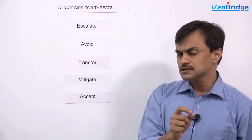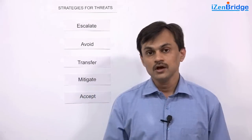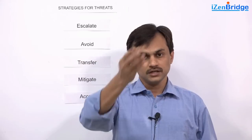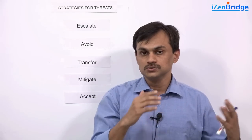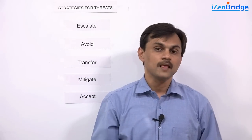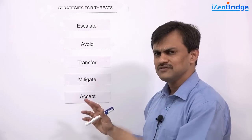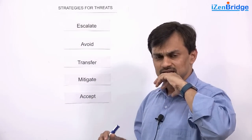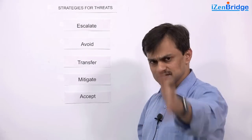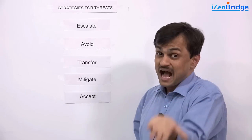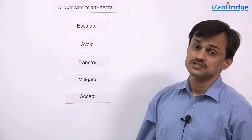Transfer not necessarily always removes the risk 100%. Even if you have a mediclaim policy, if you get sick, you end up paying good part of it. It may generate a second type of risk that you have transferred to someone, the other person is unable to take care of it. Then you have another risk where you need to do something about it because the vendor is unable to perform. Having said that, the possible strategy is can we bring someone to do this work? Can we outsource it? Can we get an insurance of it? And if something goes wrong, we have someone who will pay for it rather than I pay from my project. That strategy is transfer.